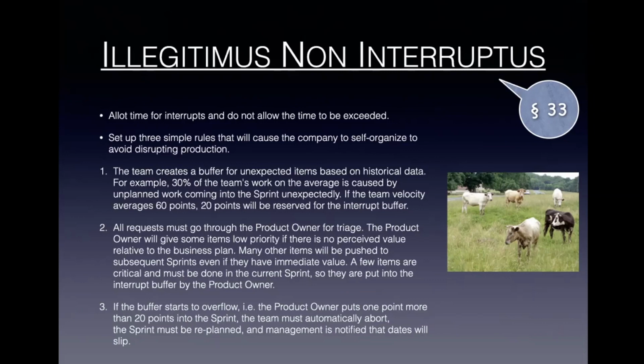So a user story is a story written by a user. Now, ideally. Now, very few users write user stories, but it's usually of the form, I as an X, so as a subscriber, as a customer, as an account holder, whatever, want Y so that Z.